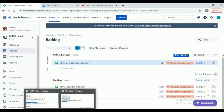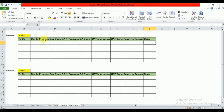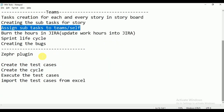So far we have seen all the sprint lifecycle. In real time: To Do, Dev In-Progress, Dev Done, QA In-Progress, QA Done, UAT In-Progress, UAT Done, Ready to Release — then sprint demo to the product owner and stakeholders — if okay, move to Done. These are all the tasks completed before going to the test cases part. By default, Jira will not support test management — for that we need another plugin, which is Zephyr.